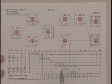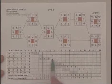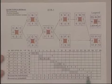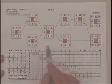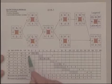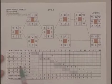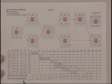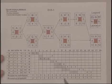So the networks become very sensitive. All the activities are critical, as you can see here with the slack of zero. And the start and finish times have been changed. So this is a second impact that resource constraints have on a network. First one is extends the duration of the project. And the second one, it increases sensitivity or alters the original critical path.